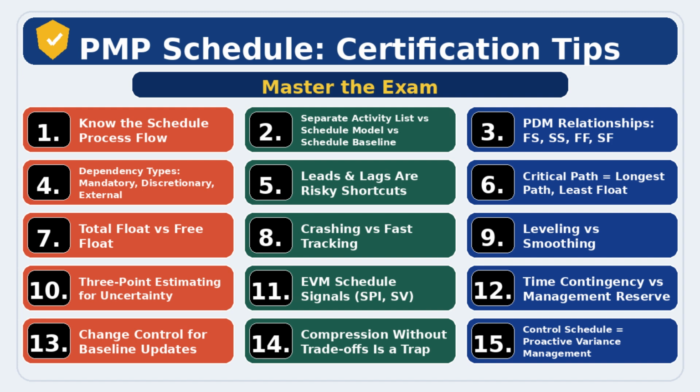PDM relationships. Finish to start, start to start, finish to finish, start to finish. Most are finish to start relationships, but exam loves the uncommon ones. Here's a scenario. Testing can start when coding starts. This is a start to start relationship. Moving on to the next step.